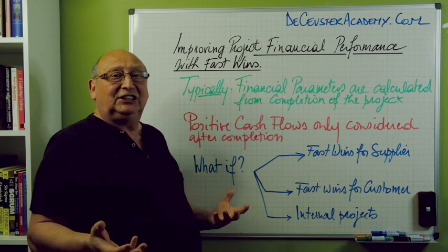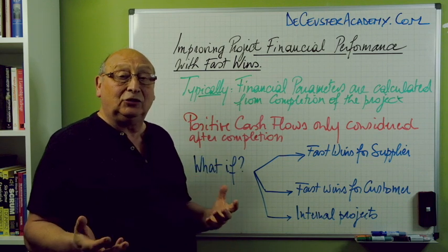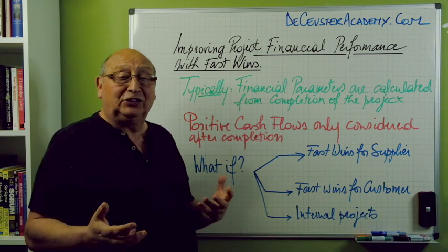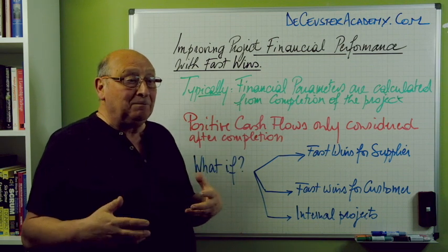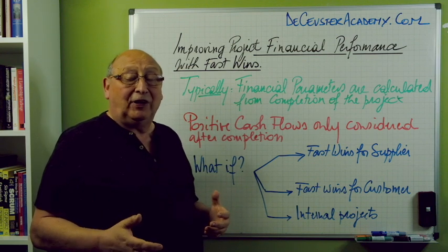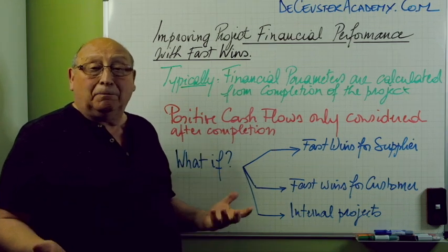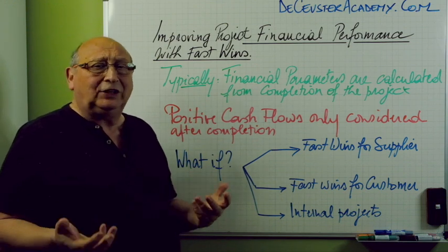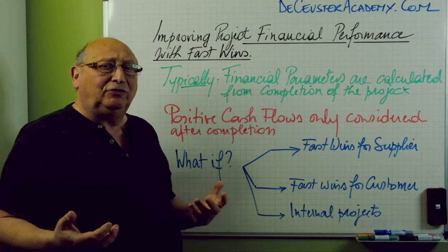And that's a very interesting element, because the moment that a service or a deliverable has been completed, we can in fact send out an invoice. And when we look at services like the type we were selling at AT&T, we can consider, for example, the one-time charge, the installation charge, and from the date of acceptance by the customer, we can also send out invoices for the monthly charges. These are things which we don't always look at the beginning when we do the planning of the project, but we can already identify it there.